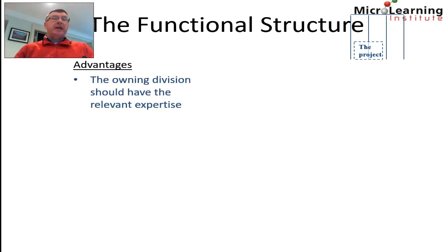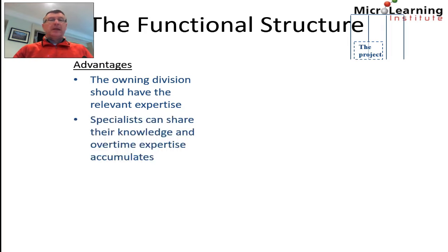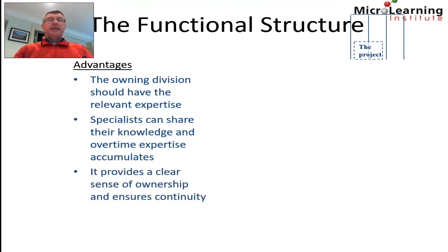Now, the advantages of that is that the owning division or the owning department should have a lot of the relevant expertise. Additionally, specialists can share their knowledge and over time experience accumulates and expertise accumulates. And lastly, we see as an advantage that this approach provides a clear sense of ownership, and also it ensures continuity, that we know who's managing the project and who has accountability for delivering it.